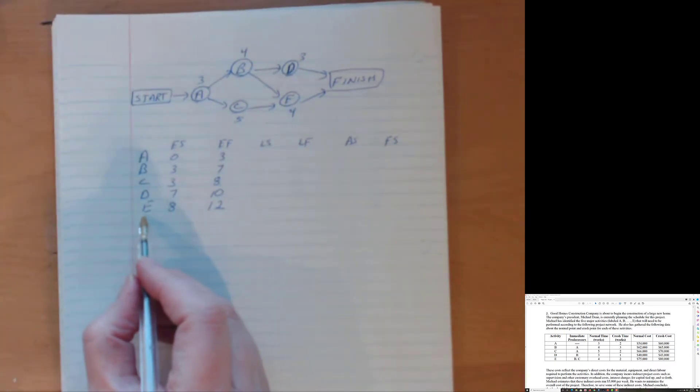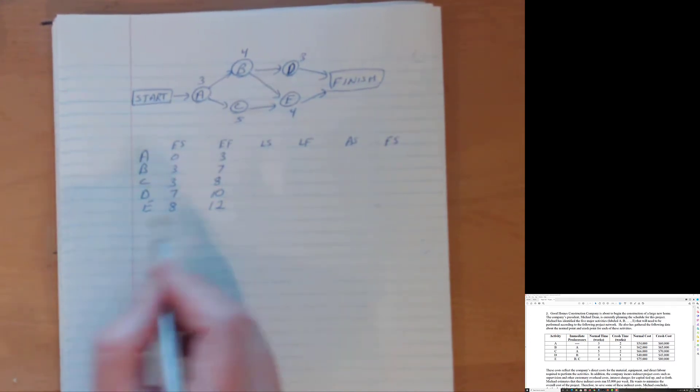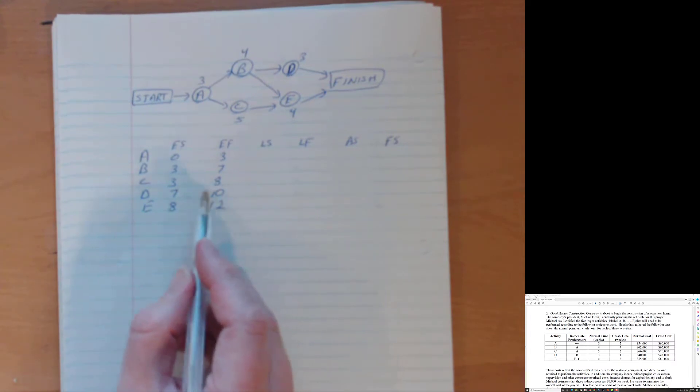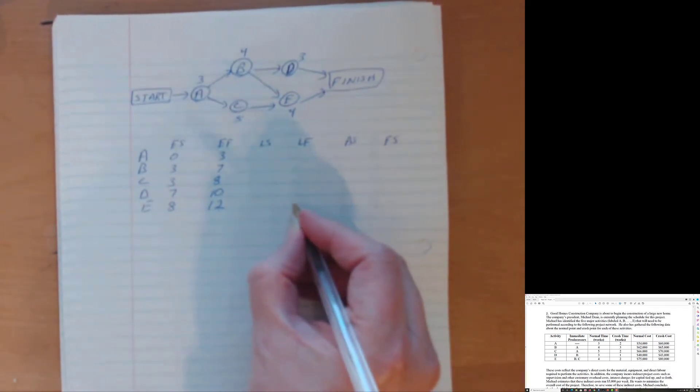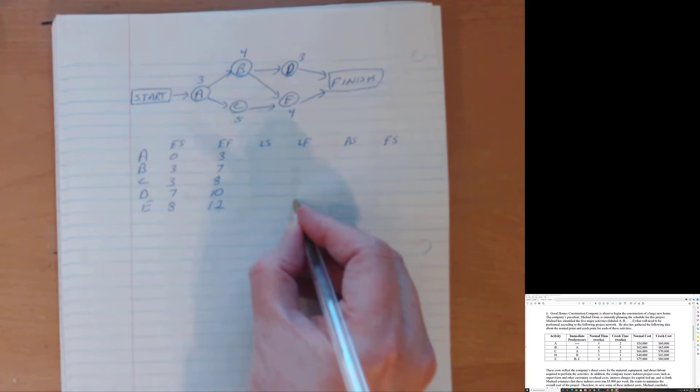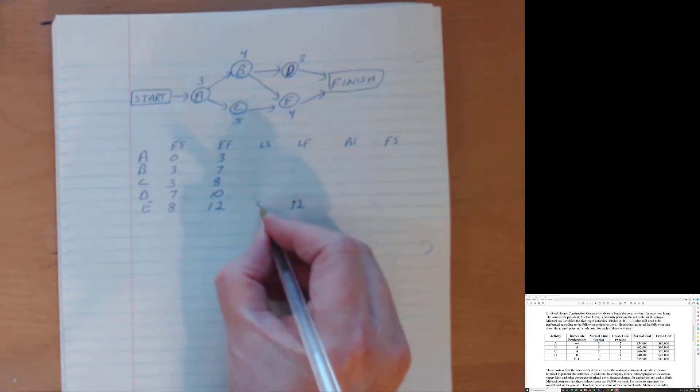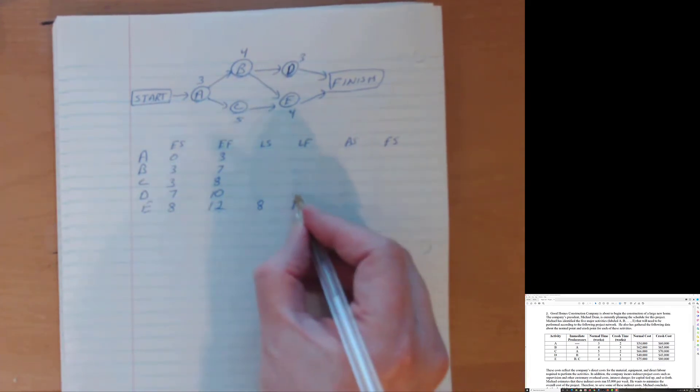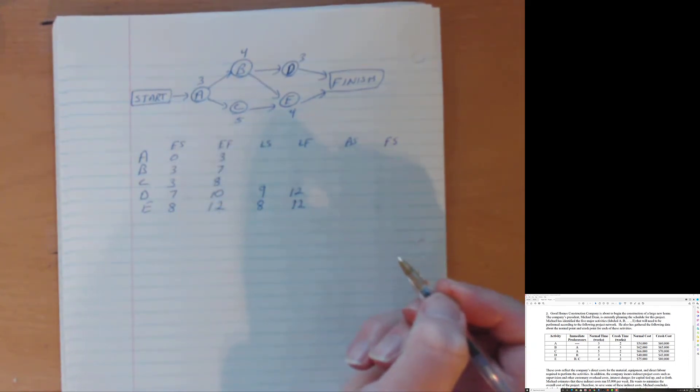And we suspect that because E is the last activity, it takes the latest that it is on the critical path. Not D because D is finished two weeks early. Can't be on the critical path that way. So latest start, latest finish. Well, we now know that we've locked in how long this project is going to take. So latest finish is 12 weeks. E takes four weeks. So 12 minus four is eight. And we do know that E is on the critical path. D has to finish by week 12 as well. It takes three weeks. So minus three gives us nine. So now we kind of know E is on the critical path. D is not.